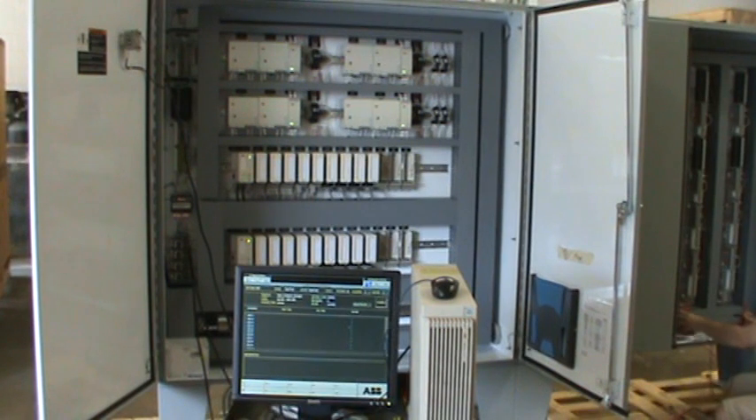One of the most important aspects of this project was to actually get a working controller and workstation to be able to drive any I/O points in this DCS system. We wanted to verify that when we drove a physical output point — whether discrete or analog — we would check it with a voltmeter to make sure we got the proper signal at the terminal strip to verify the entire system.